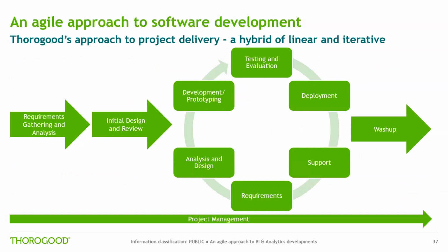Supported throughout by the PRINCE project management methodology, we ensure a solid foundation at the start by trying to understand as much of the requirement as possible. We then use this understanding to design the system to address all known requirements, which is key to minimizing the need for significant levels of redesign and rework. We then validate the design with users and stakeholders to verify understanding on all sides, and work closely with relevant people throughout the build to get early visibility of the correctness of data, calculations, report content, etc., and refine accordingly.